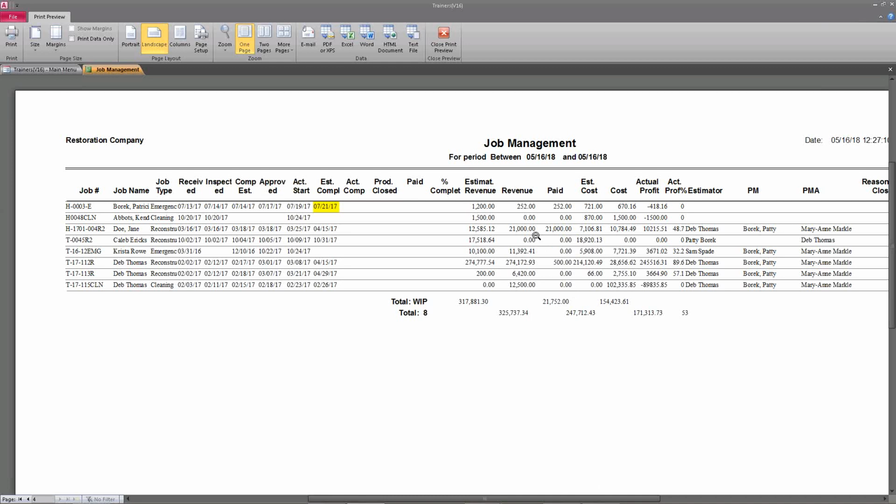The biggest one would be a supplier deposit up front. High-end kitchen. Oftentimes they want a deposit up front. And that's fair enough, if the numbers make sense to that calculation. If they've spent half of their budget, I want to hear that they may be 60% done, because there will still be bills in the mail that haven't been posted. So you want to track that.